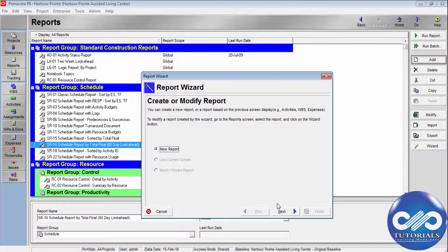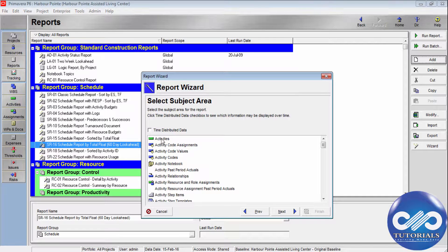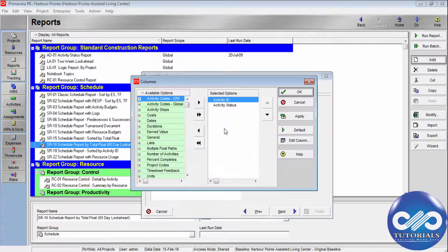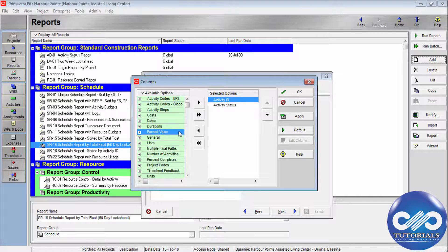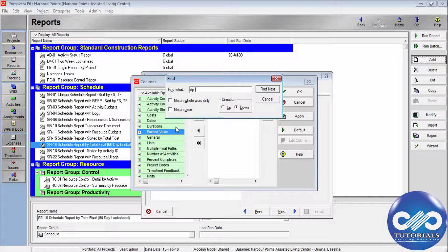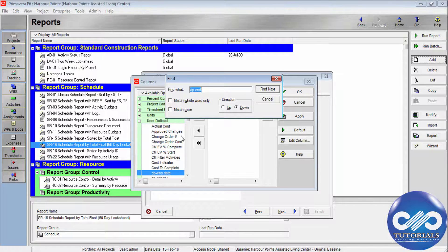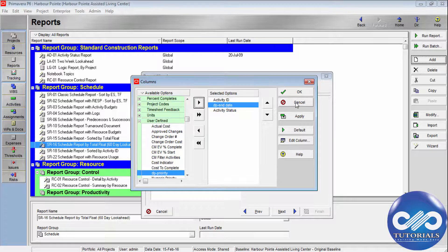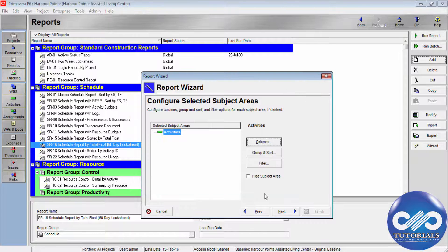You can also use UDFs in reports. Go to Tools and then Reports, add a new report, and select the Activity subject area. In the columns section, you can select DPEnded, move it to the right column, set up the report, and run your user-defined report.